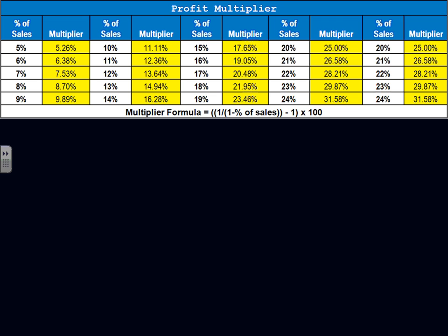So the project, when we put 10% of the sales project, some software allocates this immediately. When you put 10%, they adjust it and apply it to the sales price immediately. Any question, guys, about the profit multiplier? So if I told you I need 5% profit, you're going to say, in order to get 5% profit, you have to multiply break even by 5.26. That's all.